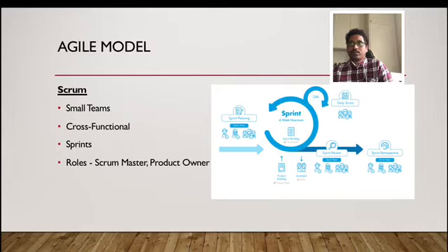Basically how it works is the product owner prioritizes the tasks. In our example of a 1 month task, he prioritizes the tasks in the product backlog and sets priorities on each task. Then the Scrum Master takes the tasks from the product backlog into the sprint backlog and sets some priorities there as well for the team, and then he starts a Scrum, which he can keep to 2 weeks or up to 4 weeks at the maximum, whichever works best for the teams.